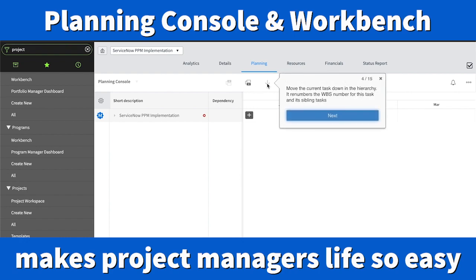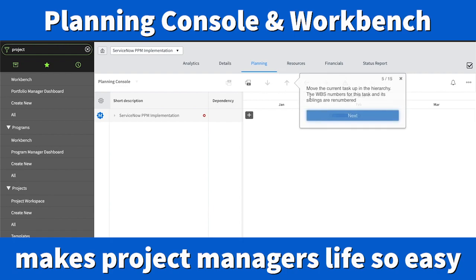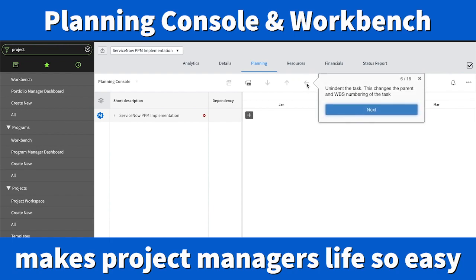Those are the features. The other important thing is the down arrow, which shows you that you can move the current task down in the hierarchy. You can make one task go down. Then there's the up arrow — in the hierarchy, you can make a task go up. There's also an arrow pointing to the left, which lets you unindent a task. This will change the position in the WBS numbering of the task. WBS stands for Work Breakdown Structure, so you can indent tasks using that.